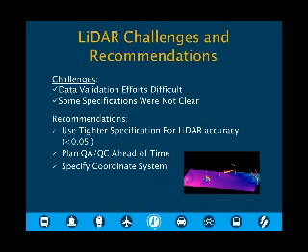MnDOT did the QA and QC shots along there, but we should have piggybacked on the lane closure and traffic control that the consultants used, but we didn't. We went out there after the fact, and it wasn't really safe for our survey crew to be out there doing that. So we weren't able to check the targets like we wanted to, and some other points.